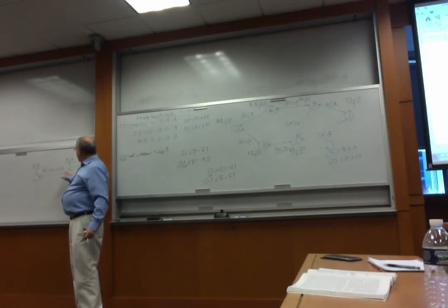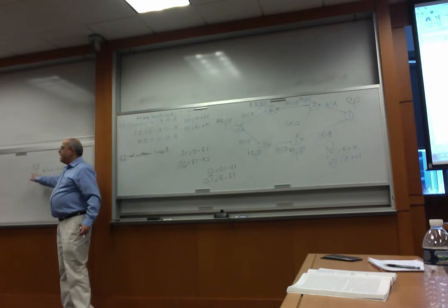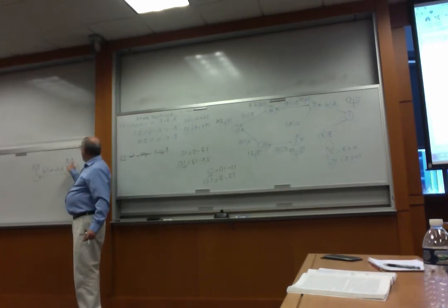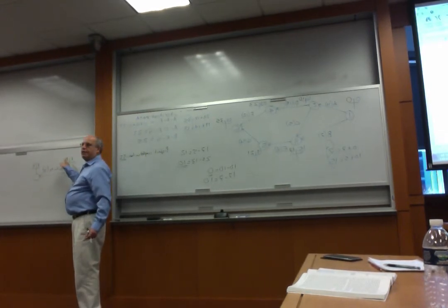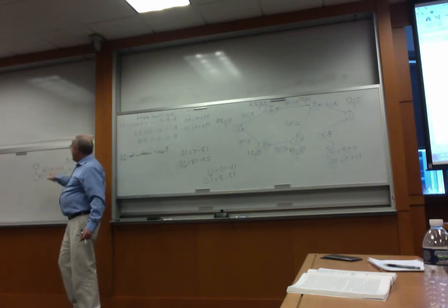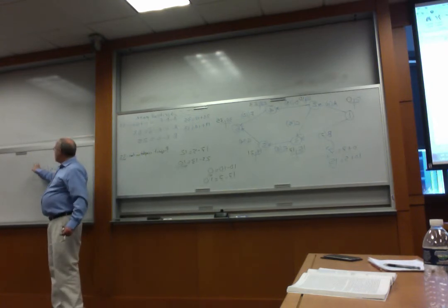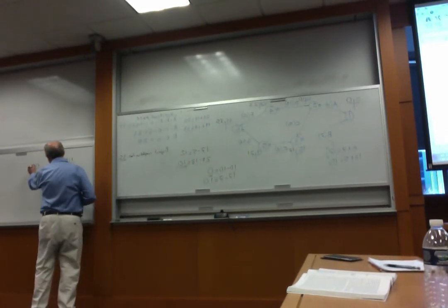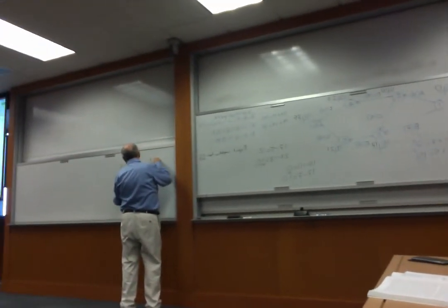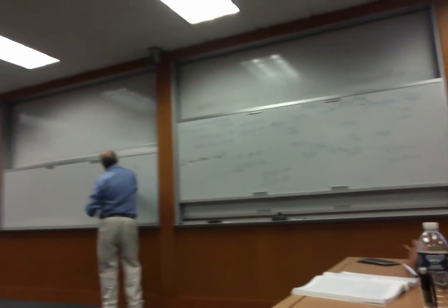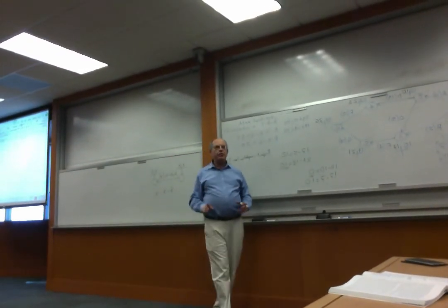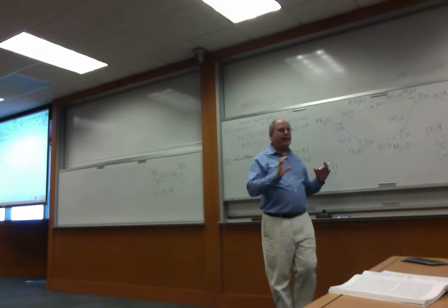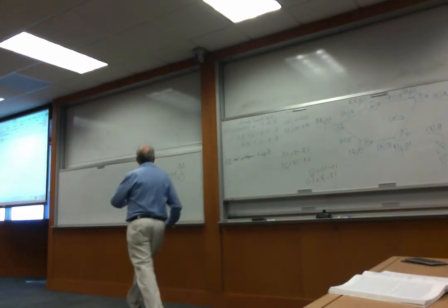The activity starts here and ends there, okay? On the starting point, the values must be equal. Look at what I put: kk, the same number. And where it ends, the values also must be the same, ll. And more important, this number minus this number equals the length of the activity. So for an activity to be part of the critical path, three conditions must be true.